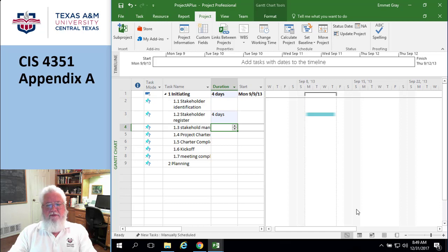Here's an interesting thing about this duration column. This is the allowable amount of time that you can do. Let's say something's going to be 40 hours long. You could put 40 hours down, right? Makes sense? You can put 1 week down because that would be equivalent, right? Because we're only working 8 hours a day under that time schedule we just talked about.